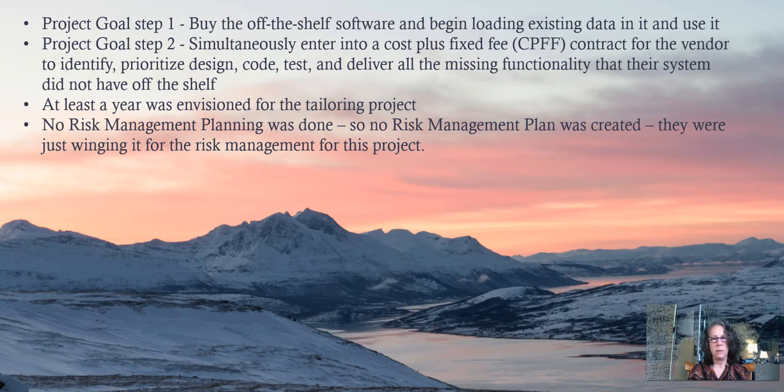Then the idea was to prioritize those, develop them, and then stagger and schedule those and implement them into their custom version of the system. That was the plan, and they were thinking that they would need at least a year for this entire project. And in this context, there wasn't any formal or even any informal risk management planning done, so there was no risk management plan.